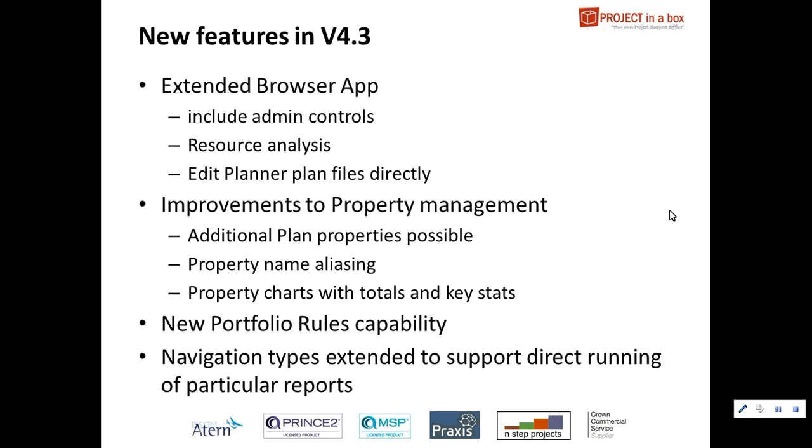We've taken that a step further, and we now have an argument associated with several of these functions, which is that you can name the particular saved report on project and portfolio reports. So that means you can have a button that says post a report. You click on the post report button, it fires off the form, but then runs it automatically with that particular chosen report in it. So for occasional users, for sponsors, etc., you can give them a navigation diagram which allows them to immediately interact with the latest content without them having to really have any sort of feel for what they do. There's an arrow saying run this, press this, and they'll get that report coming up.